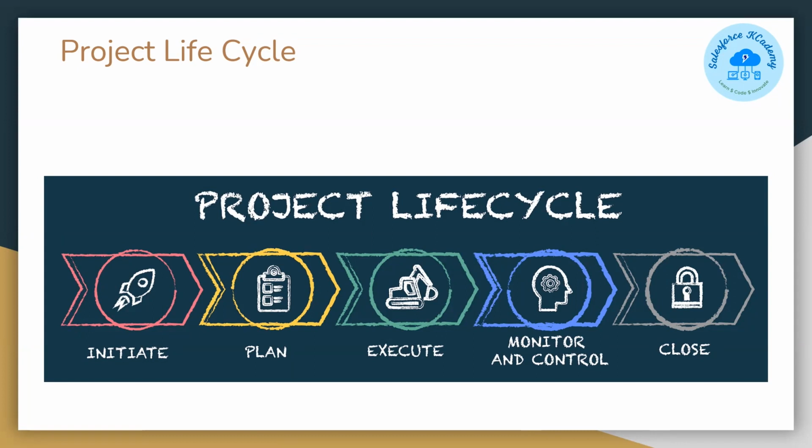So in the planning phase, whatever requirements we have taken from the initiate phase will be distributed accordingly. If it is an administrative task, it will be assigned to an administrator. If it is development, coding related, it will be assigned to coders. If it is already existing, and we need to test that, or fix the bugs, then before fixing the bugs, there needs to be a tester from our end who needs to test this functionality. So in this way, the planning will go. It's mostly about time allocation and resource allocation, you can say.